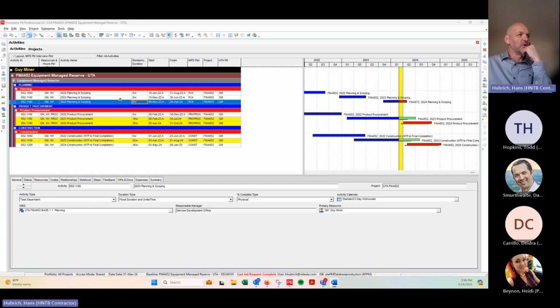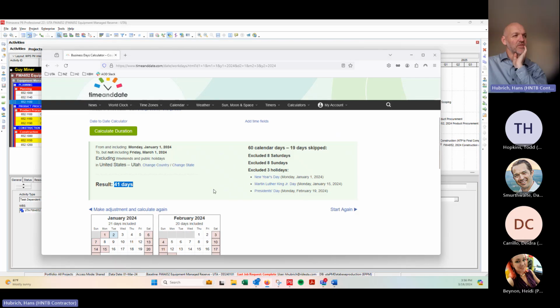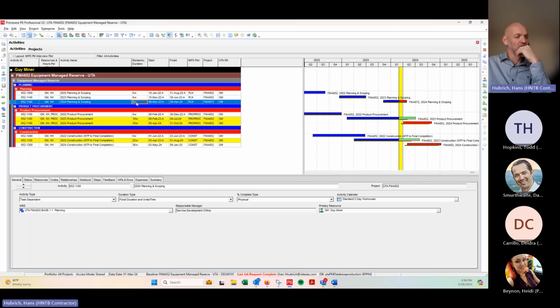Okay, my apologies on the week versus days. My guess is that this is actually calculating 8 weeks, and it's recognizing automatically that 2 of the days in the week are non-work days. My trick with calculating working days works specifically when you're scheduling in days instead of weeks.